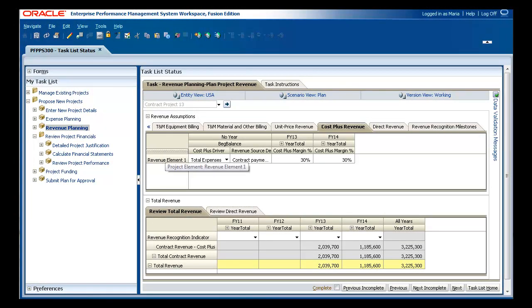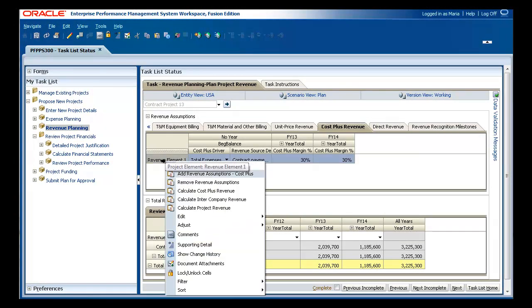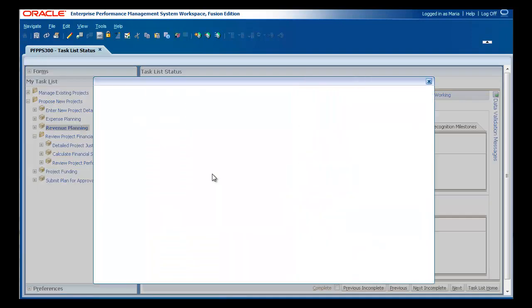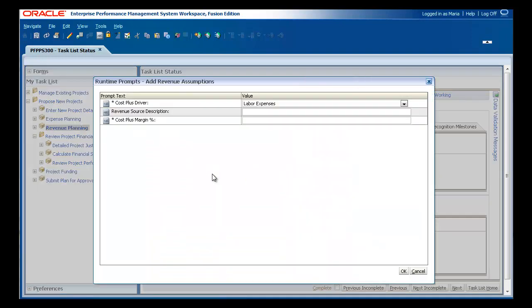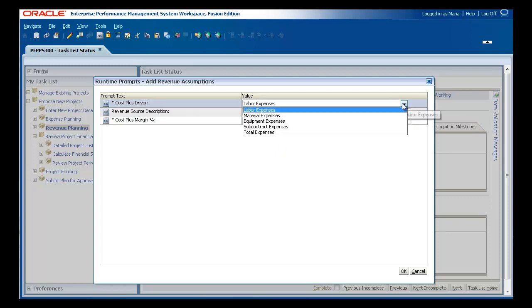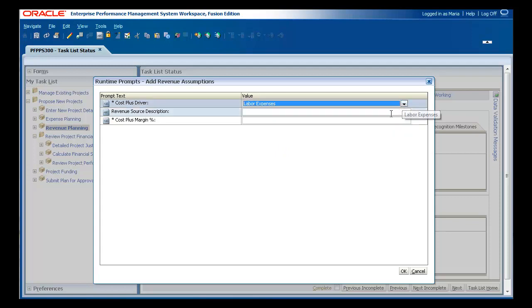Under cost plus revenue, for example, you enter the cost basis and percent margin, and Project Financial Planning calculates revenue based on the expenses you have already entered.